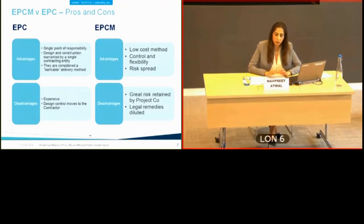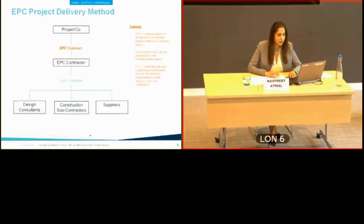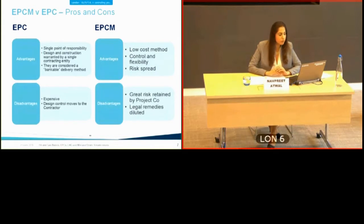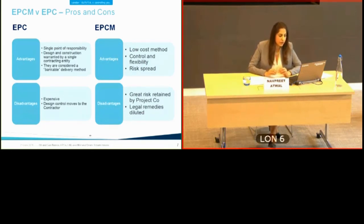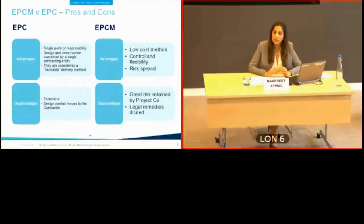The EPC method offers a single point of responsibility. The project company manages only one contract — with the EPC contractor — so for any design or workmanship fault, the owner goes to one person. Lenders are much more comfortable with EPC because it offers bankability. The disadvantage is cost, because the contractor takes on a large proportion of the risk.